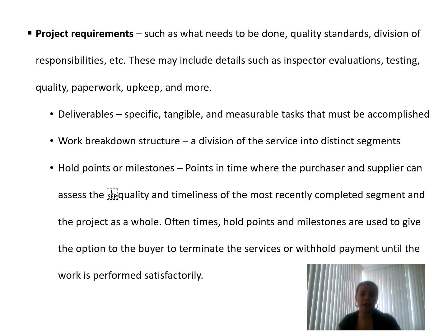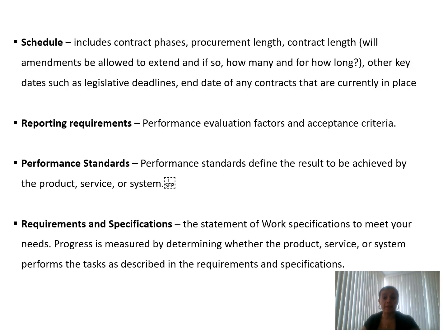The hold points or milestones are the key decision points throughout the schedule, so we will stop at those milestones to make decisions or review the project. Oftentimes the hold points or milestones are used to give the buyer the option to determine the service or withhold payment until the work is performed satisfactorily. The schedule is very important. It includes the contract phases, procurement length, contract length, and other key data such as legislative deadlines, dates, and main contract occurrences. It has the most important dates from the procurement process.